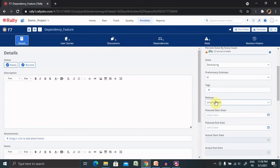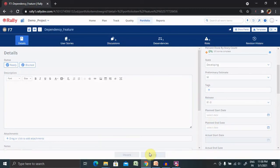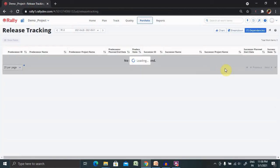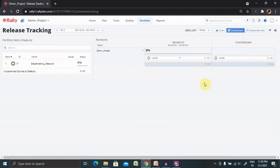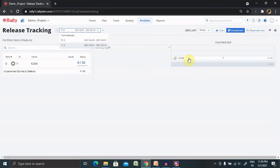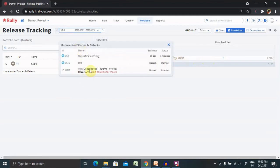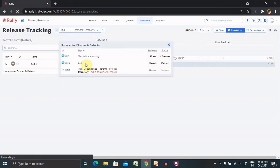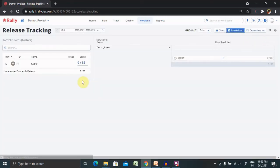I'll set the release to R1 and save. When I go to Release Tracking I find the dependencies breakdown — selecting R1, I can see the feature level dependency. When selecting the user story level dependency, the user story level dependency is also available. Select it and you'll find the dependency detail. After refreshing the page, both dependency tabs are available inside this feature. This is how we create feature level dependencies as well as user story level dependencies in Rally.